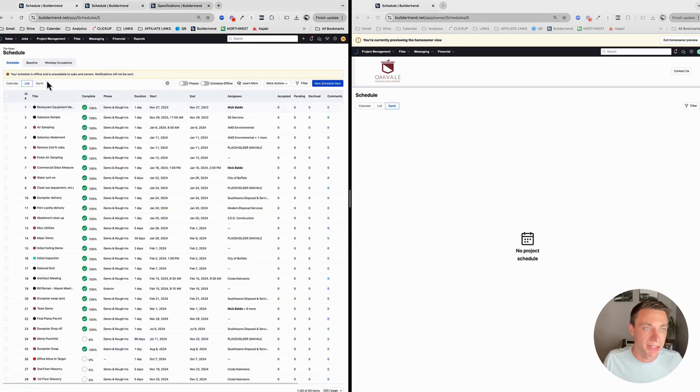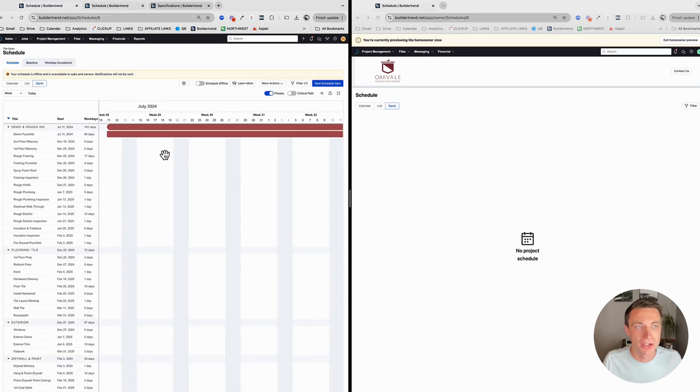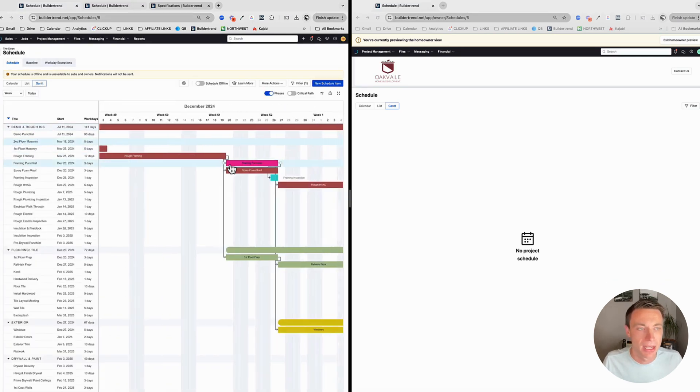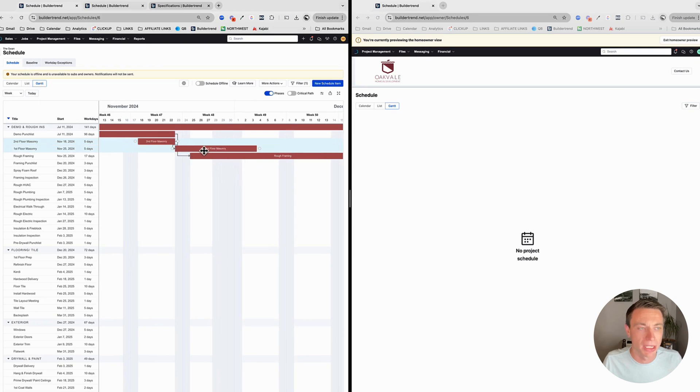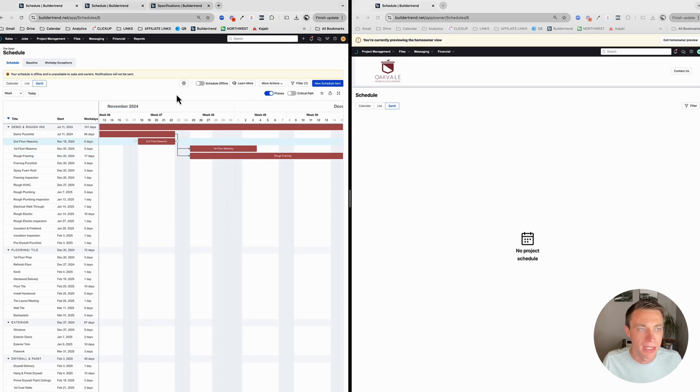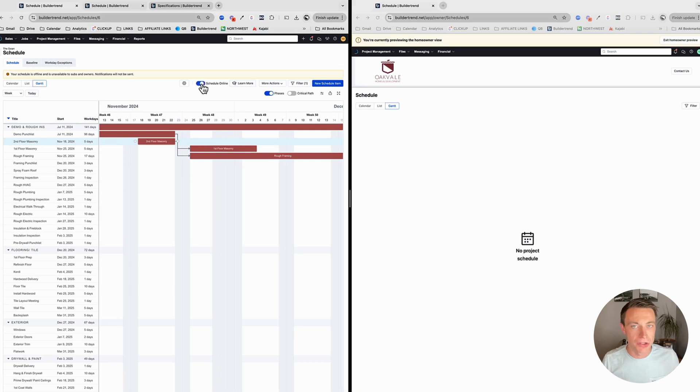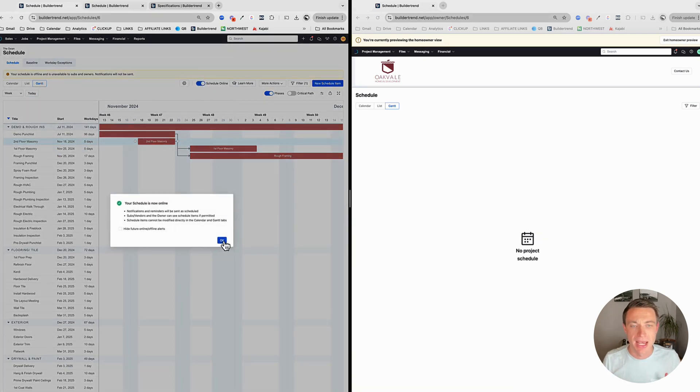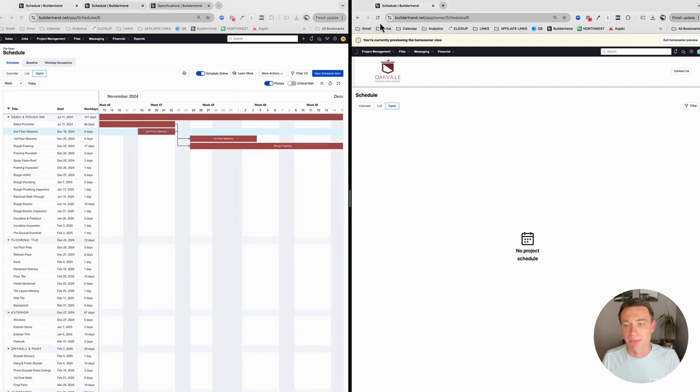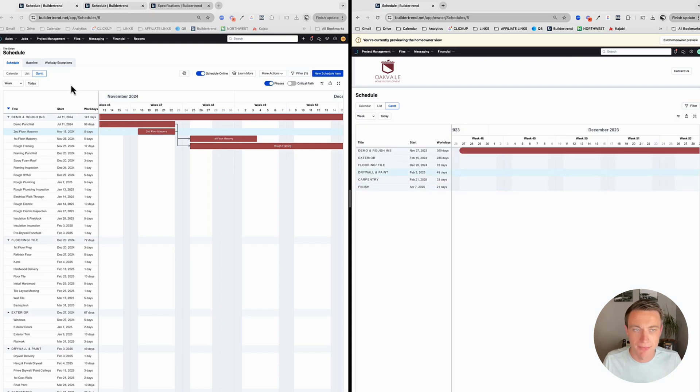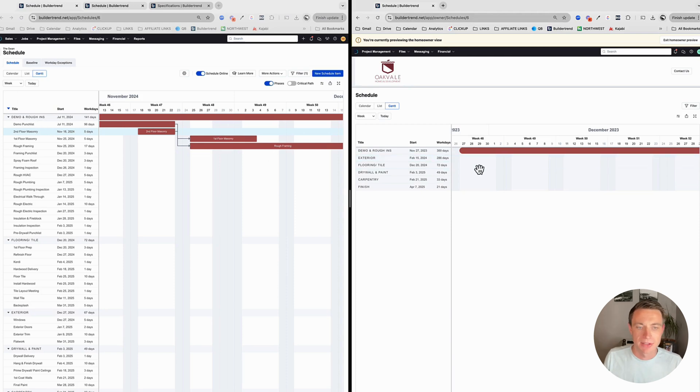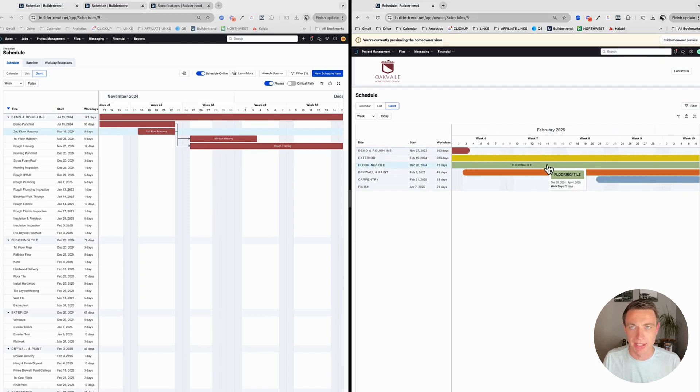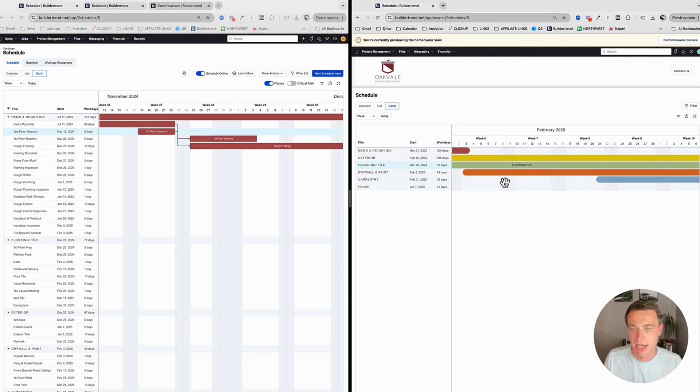I can say no items, I can say full schedule, etc. Now I'm going to come back to this in a second. So I've indicated that I can see the full schedule, so that should be good. But the problem I have must be elsewhere because the customer can't see anything. And that is typically because our schedule is offline. In my scheduling video, I talked about the benefits of turning the schedule offline. We can click and drag things around a little bit easier. Having a schedule offline is a great way to work faster. But if it's offline, that means the customer can't see it. So I'm usually turning the schedule offline if I have to do a lot of changes. I don't want to send notifications all the time. I'm going to turn it offline, but I must remember to turn the schedule online if I want my customer to see it.